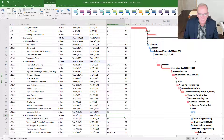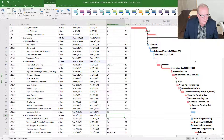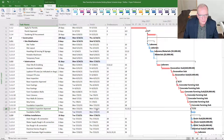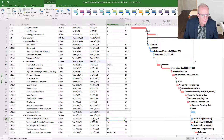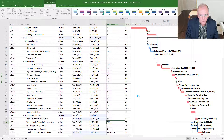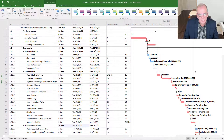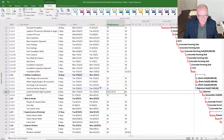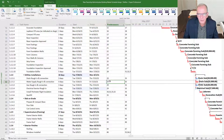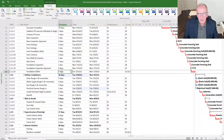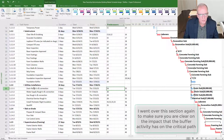That buffer doesn't mean anything unless you connect the successor activities to it. Instead of having those activities all connected to number 28 (foundation inspection approved), I connect them to number 29 — the foundation buffer. I put that in for those three or four activities. Now that has given me this buffer on the critical path, and it's also changing my time frames. If it's affecting the overall critical path it's pushing that outward, giving me that extra five-day time period.